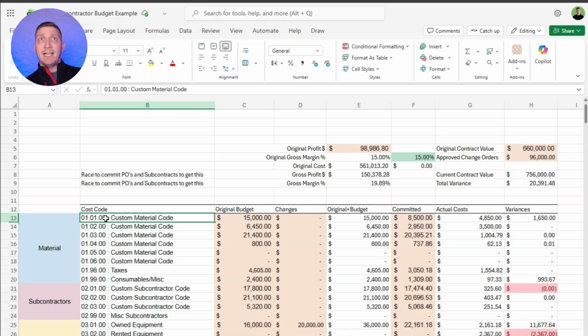we have it set up where under material, we have a bunch of cost codes. You can have up to 10,000. I just have up to 100 because my subcontractors don't need 10,000 cost codes. I don't want them to even know that's a possibility, because then they'll want to track wire nuts. But what we do is we think again about $10,000 or higher, like an annual dollar amount, because if it's under $10,000, it's really hard to make it worth its time to track.